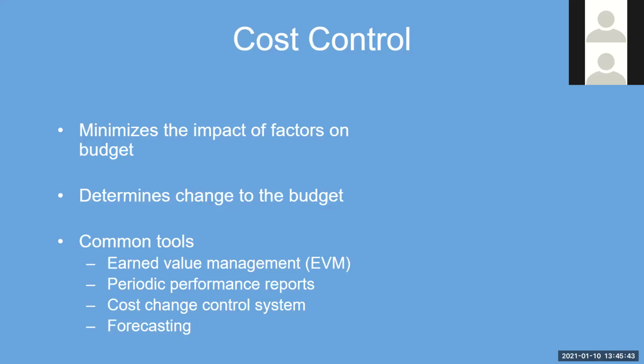Depending on how fast or slow they are in their schedule, that number could change. So if in 2 months they did not achieve their deliverables, they were behind by 50%, that means over 2 months, the earned value is only $100. And they are behind because they should have earned up to 200.